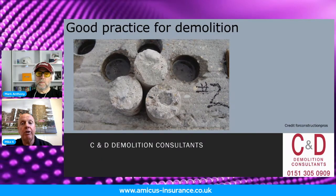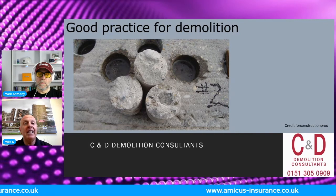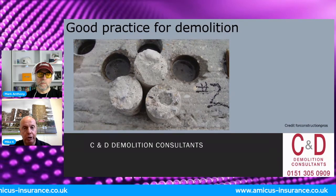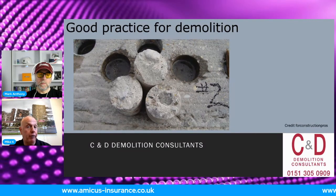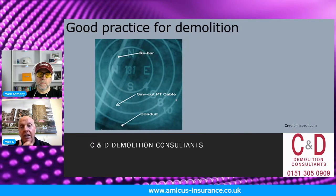Was the reinforcing put in place? And how can we find that out? There are a number of ways we can do it, and it's pretty inexpensive. We can take some core samples. Let's see what the strength of the building is. Let's take multiple core samples and see what reinforcing is there. Then we can do a compression test to see what type of strength is left in the floor slab.